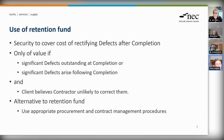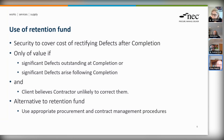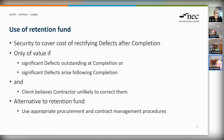To summarise the use of a retention fund under NEC: the main purpose is security to cover the cost of rectifying defects after completion. A retention fund is of value if there are significant defects outstanding at completion or significant defects arise following completion — but only if the client believes the contractor is not likely to correct them. If there are very few defects, or if the client is confident the contractor is likely to correct them, the retention fund offers no great benefit.